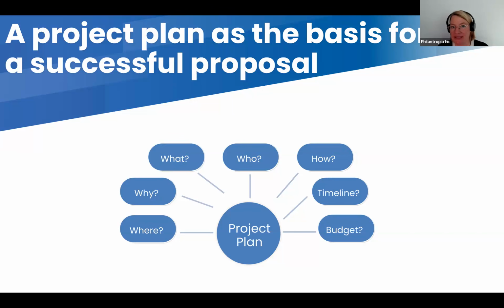Maybe you've already taken part in one of our webinars about strategy development. There we always say how important it is to know where you want to go, to know your financial needs, because if you don't know your financial needs for the next 3 to 5 years, then you can't do proper donor research. You don't know how to develop a strategy for that, because your strategy will look completely different if you need $10,000 or if you need $1 million. So that's why including a budget in project plans is also important, because you need to know where you're going. You need to know the direction. This doesn't need to be the final perfect budget, but you need a ballpark figure. You need to know where you're looking, again, whether you're looking for $10,000 or for $1 million, because that's going to look very different.